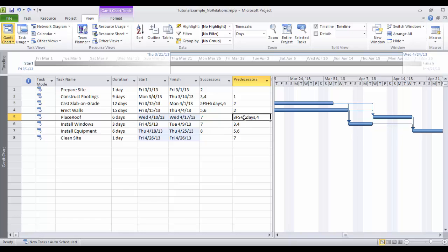So now if I add just the E here, you'll see 6 days of elapsed days. Now you see you're counting the non-working weekend days. So this is just the difference here.